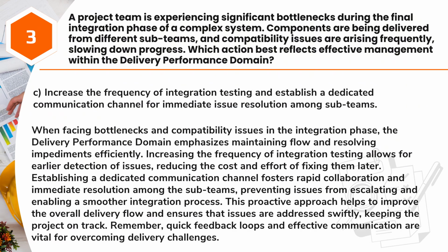Answer: C. Increase the frequency of integration testing and establish a dedicated communication channel for immediate issue resolution among subteams. When facing bottlenecks and compatibility issues in the integration phase, the delivery performance domain emphasizes maintaining flow and resolving impediments efficiently. Increasing the frequency of integration testing allows for earlier detection of issues, reducing the cost and effort of fixing them later. Establishing a dedicated communication channel fosters rapid collaboration and immediate resolution among the subteams, preventing issues from escalating and enabling a smoother integration process.